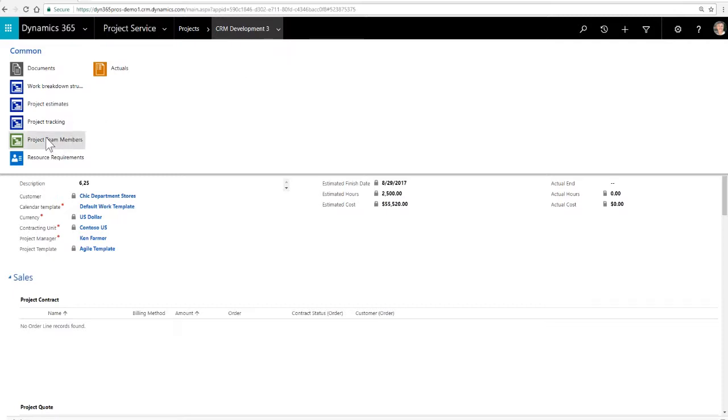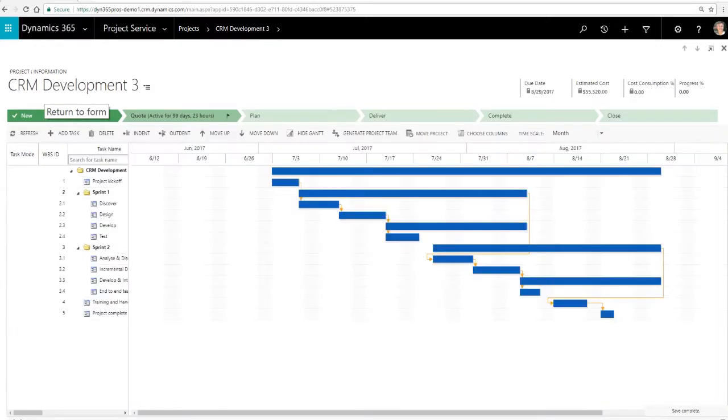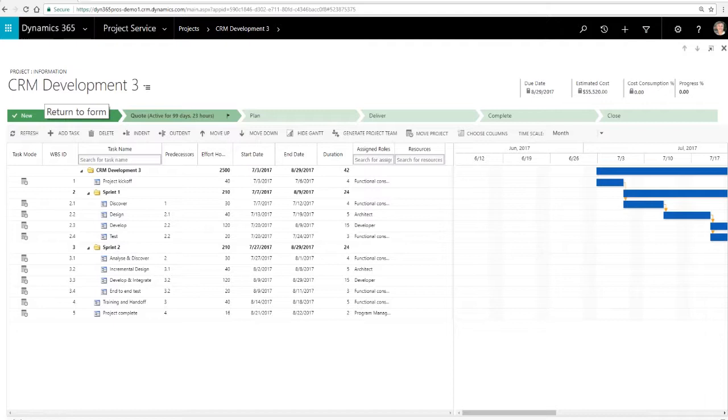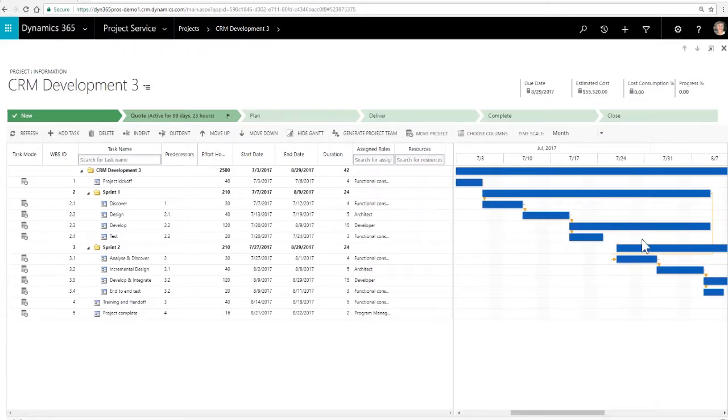And unfortunately, we don't have a lot of time to get into that today, but I will show you some that are created. And then, of course, we've got the different project quotes. There's a couple of different ones down here, and then your opportunity. The team is, once you start assigning resources, whether it's a role or whether it's a person, each person you can have set up with a cost level attached to it, as well as what their billable rate is. All of that can be put in here and controlled.